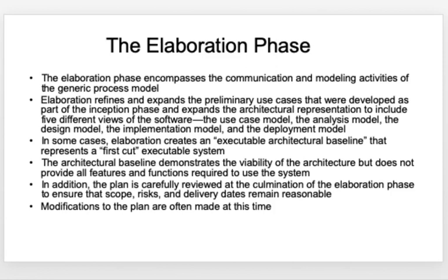Then you carefully review the plan, and at the end of the elaboration phase, you make sure that the scope, the risks, and the delivery dates are quite reasonable. Most of the modifications to the plan are done at the end of the elaboration phase.